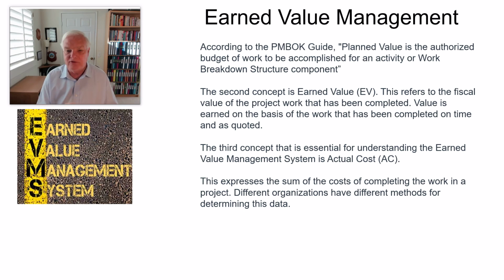Now, different organizations have different methods for determining this data. I've worked with smaller organizations and we did back-of-the-hand calculations, or what we refer to as poor man's earned value, and we only looked at a handful of different techniques, different things to keep looking at. And I've also worked in a heavy aerospace environment where we did everything. We covered every element of earned value all the way down to TCPI. So you're going to see a lot of different flavors. What you need to understand is that earned value needs to be tailored to a position that makes sense for you and your organization.